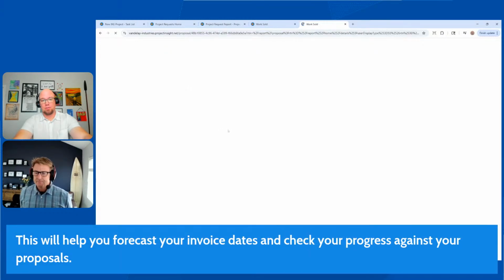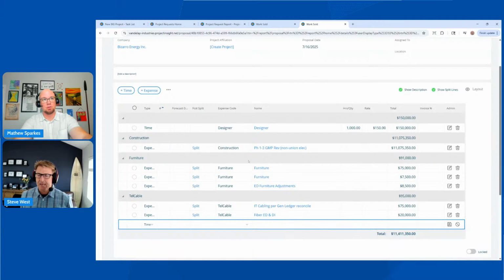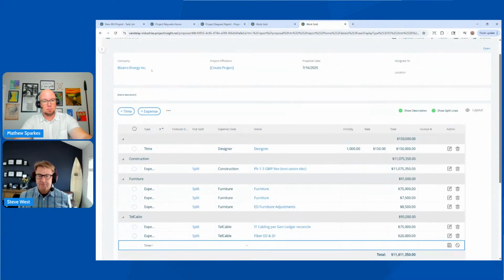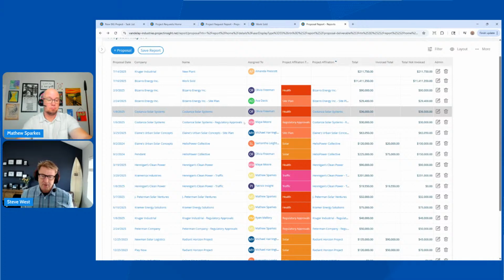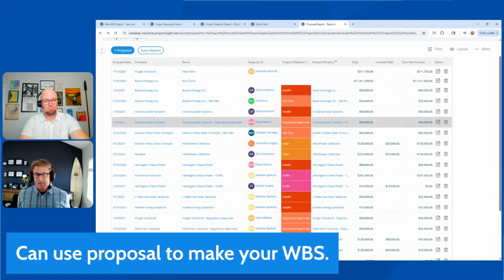You can move all of these deliverables into the WBS even, right? That's what you can do if you want. I don't know that that's the recommended process, but some people do that where it might be simple enough deliverables that you can just make a task out of every line. But very often the order lines don't line up with the actual work that has to be done. And that's why those are separated, so that